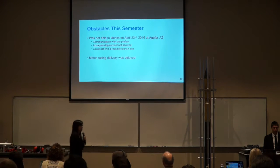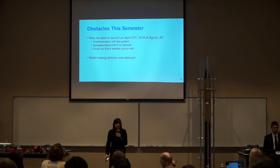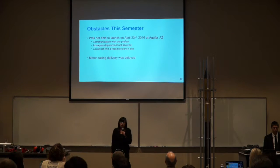We've encountered some issues this semester, as noted by Dr. Benavides. First of all, we were not able to launch our rocket last Saturday in Aguila, Arizona. We had issues with communication between the prefects in the beginning of the semester. When we got down to Aguila at the launch site, we were told that our mission design, maximizing the time that we have in the air, was not allowed because we would potentially be exceeding our radius limit. Because of that, we were not able to launch in Aguila, and we were not able to find a feasible launch site with the time that we were given.